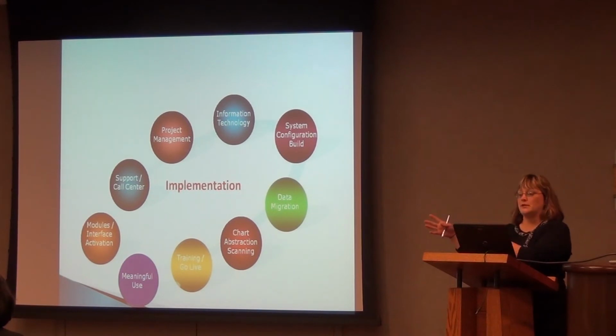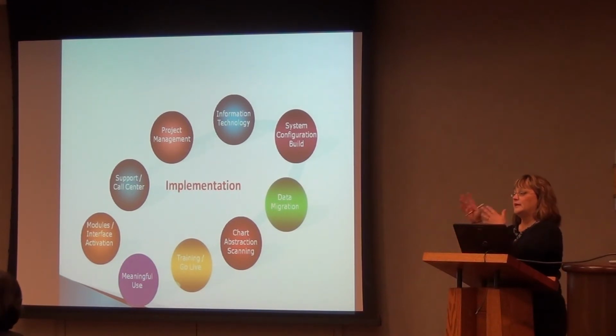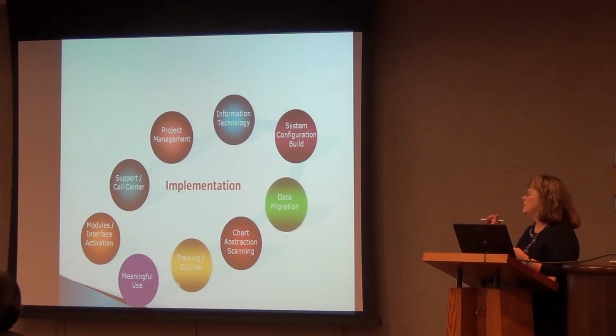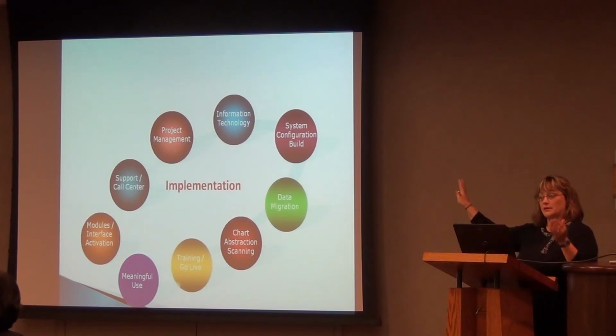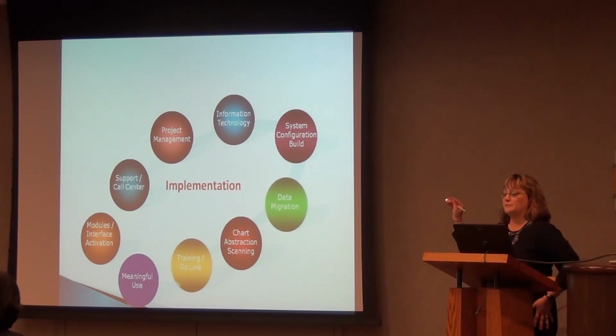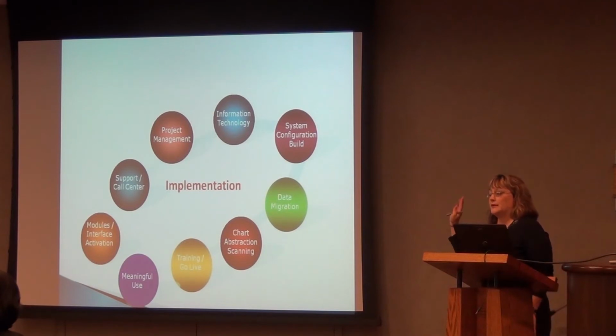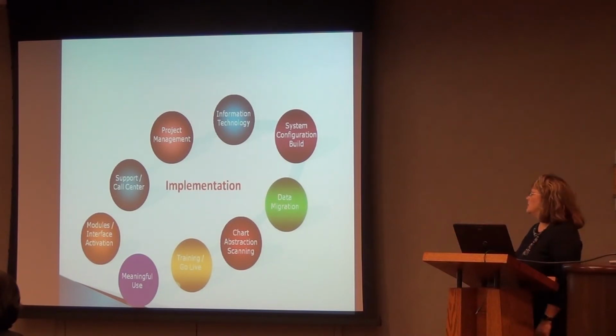The misconception is that we are going to wake up one day and everything will be electronic. It is typically a year process, depending on how fast your patients come back to the practice, for you to fully become electronic or paperless. So a lot of salespeople will say, oh, you've got EHR, everything will be fine, it'll be totally electronic. I just want to dispel that myth.